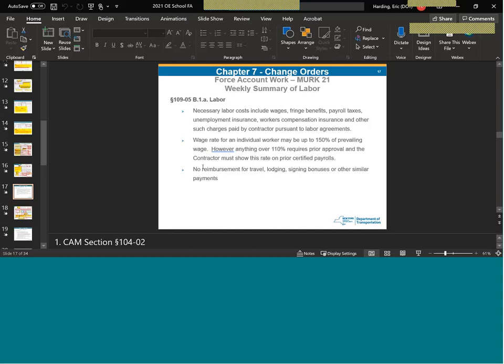The current force account spreadsheet does not allow change in service markup. Mike, do you have anything to add on that? I don't, honestly. We were going to talk that over with Erica and Amelia, because I think what the RE is asking is that time-related dispute compensation, if you read the specification, doesn't make any mention of profit and overhead 5%, as it does for your extra work, 10905B.